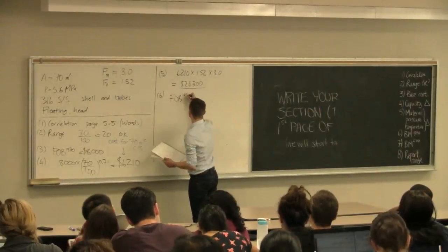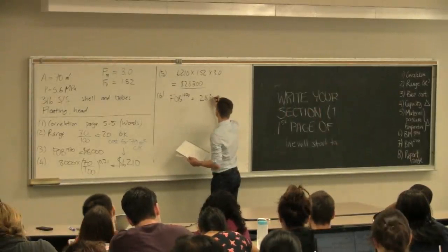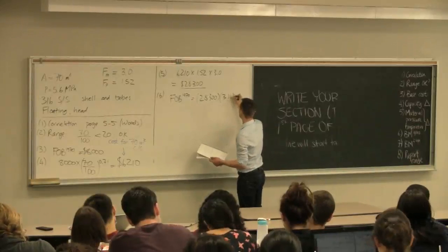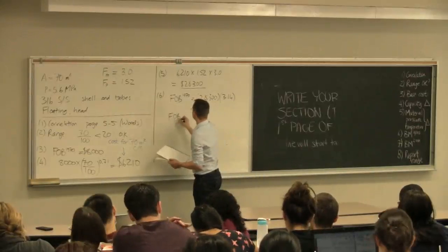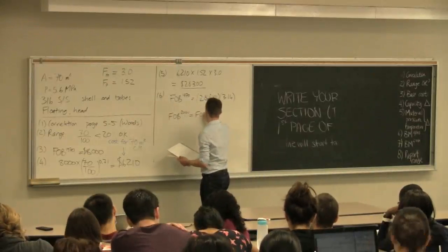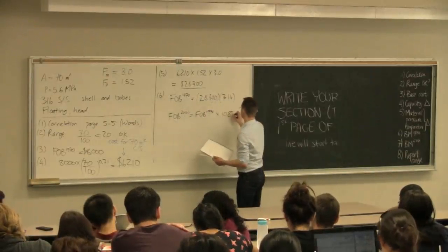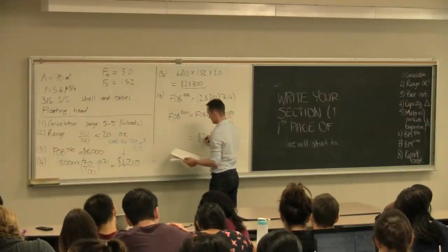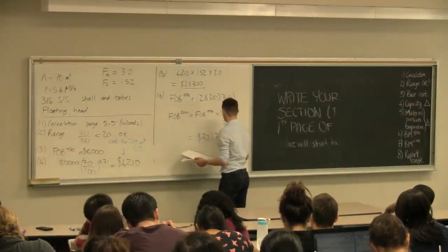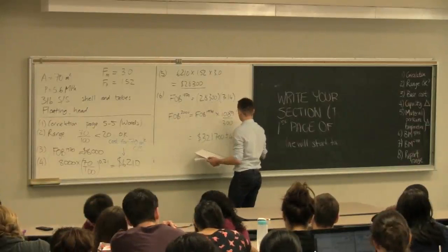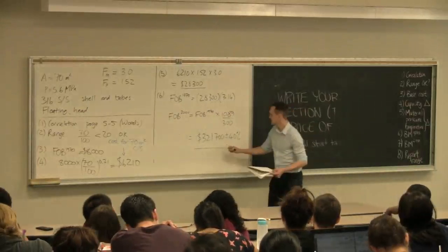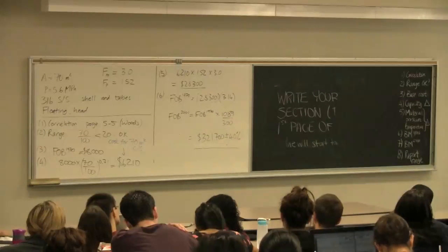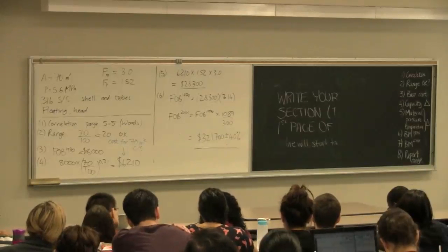So then you might want to say FOB 1970 is to take this 28,300 and multiply it by the bare module factor up on the table, which is 3.14. And then you may say FOB in 2000 is to take FOB in 1970 and ratio it by the inflation rates, and then report a final cost of 321,700 plus 40%. So let's take a note of this number, 321,000. What might be wrong, and why am I saying that this is not the approach to follow?